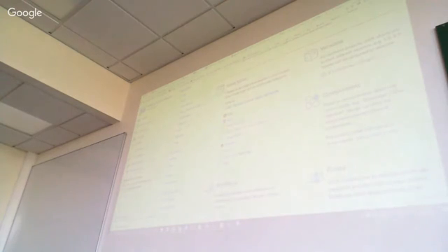We don't know anything about your project, so we're just going to call it a task because we don't know anything about what you're doing. But you can add new task names and make new workflows for those tasks, right? Blocking is one that sometimes is added. So you add to the columns of status, you can add blocking, where you can say something is now blocked, so it needs something resolved before it can go back in progress. That's a status you can add. So it allows you to do those sorts of things.